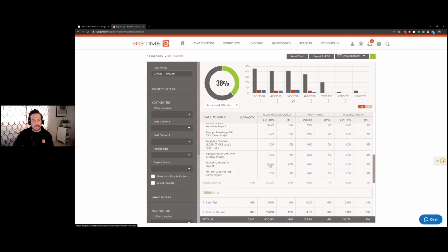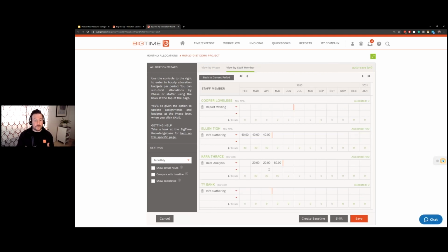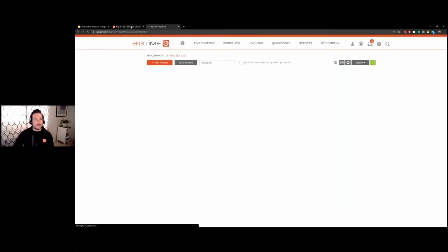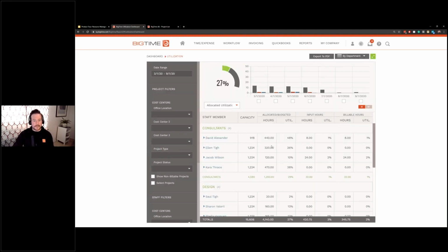We can now use these drill down links to get right back to that allocation wizard and say, hey, you know, unfortunately, we can't have 80 hours for Kara in May. She's overbooked. You know, we'll need to drop that down to 60 and see if Cooper, in this case, got it. He does have the availability. Cooper can go ahead and pick up those 20 hours. So save. And then now our utilization dashboard will be here, updated in real time. And we've now taken care of from overutilized to at 95% allocated utilization.